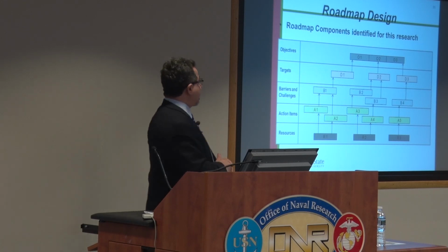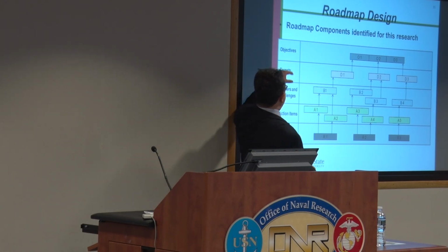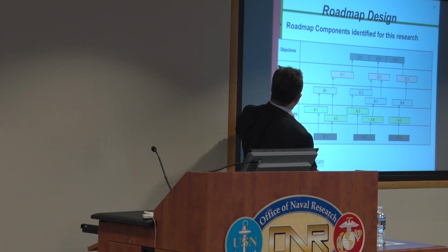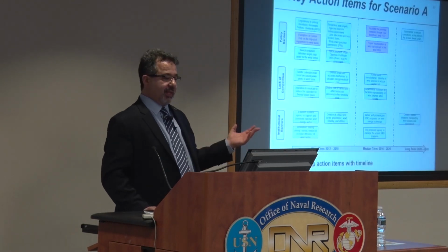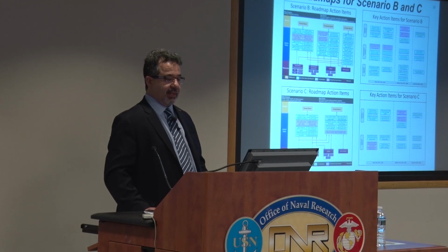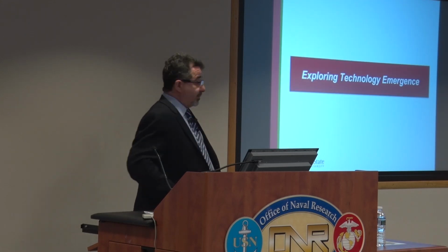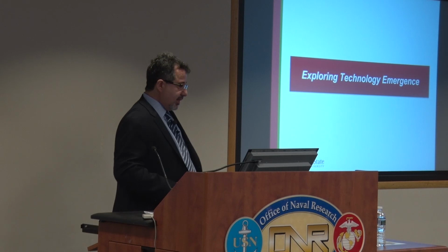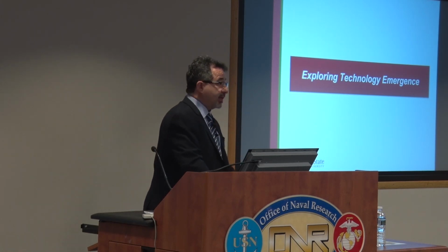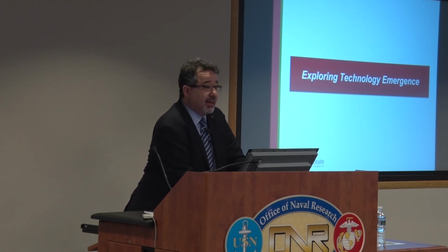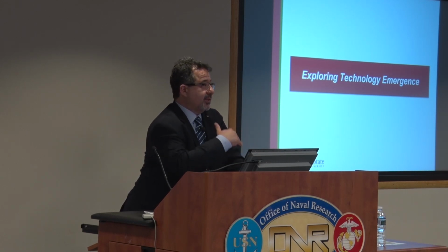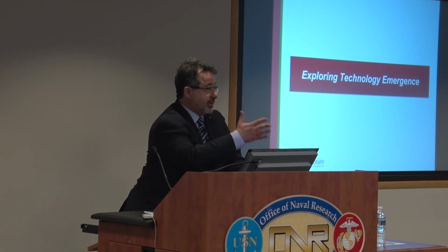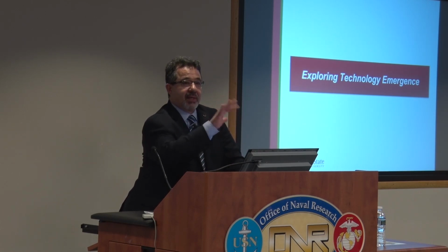And then he developed a similar but different model. We looked at barriers and then action items to remove barriers in this case, and came up with roadmaps for different scenarios and actions, and these are the scenarios we came up with. Now, the problem with that, of course, is we had to develop a further system of what to start with. When you have multiple scenarios in a roadmap, which step do you go first, right? So we looked at which are the common steps, and then we could start them and look around at what was happening and adjust.